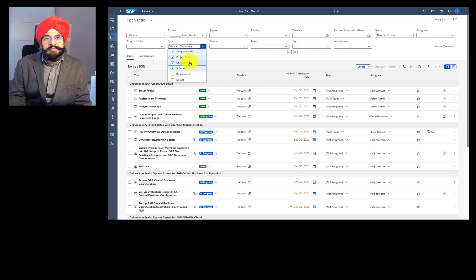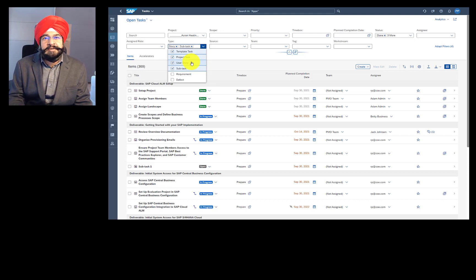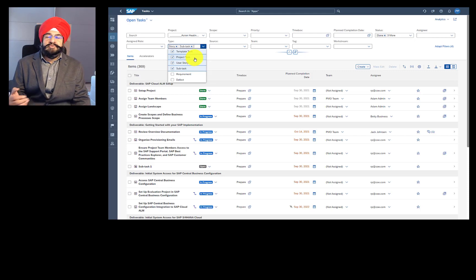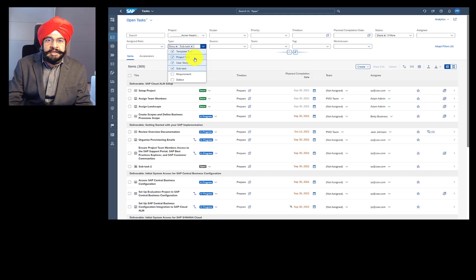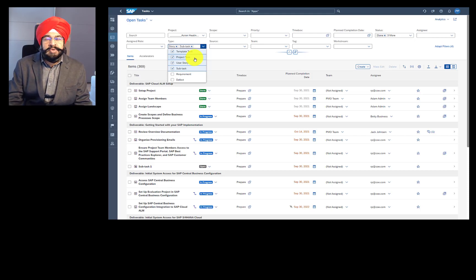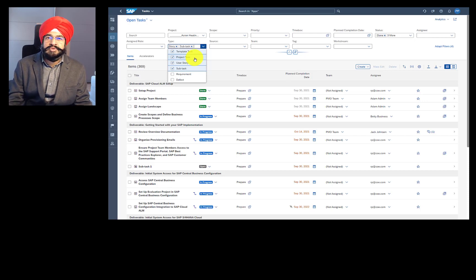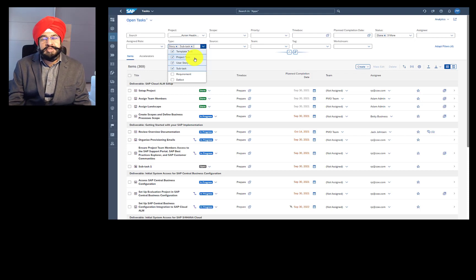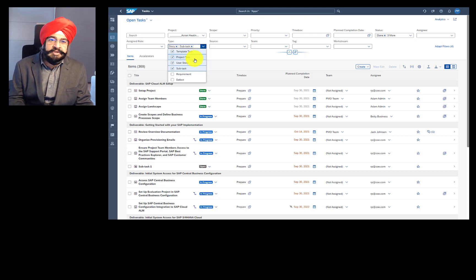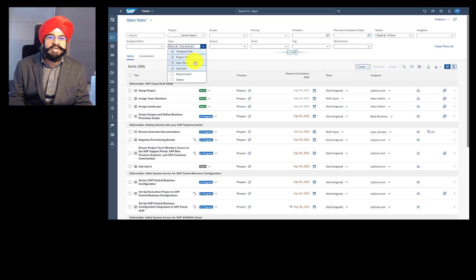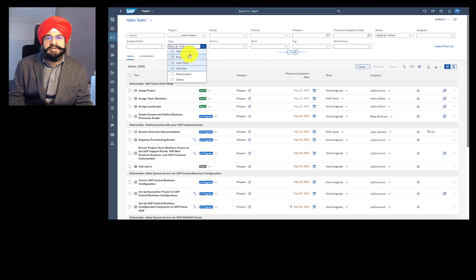User story and project tasks are similar from a technical perspective, but they have a completely different functional purpose. We recommend you use project tasks more for coordination or alignment or to track things that have to be done. But user stories have far more functional aspect. In fact, in the requirement to deploy processing, we actually recommend that you start with requirements, break them into smaller units called user stories, give them story points, put them into a sprint and adopt agile methodology with the agile mindset. So that's why a clear separation by type itself helps you focus on what kind of information is in what kind of task type.